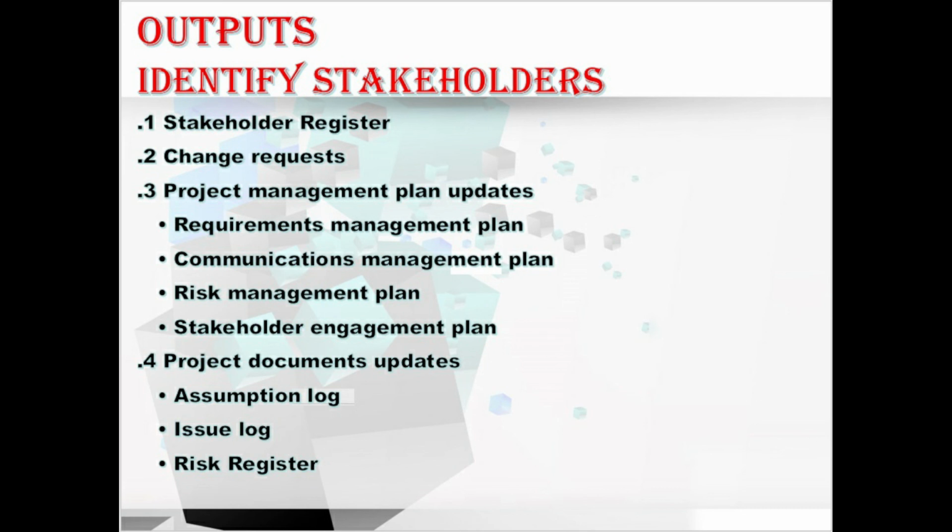We have project document updates, which contains assumption log, issue log, and risk register. Let me explain one by one. First, with assumption log. In this output, much of the information about the relative power, interest, and engagement of the stakeholders is based mainly on assumptions. All this information is entered into the assumption log.